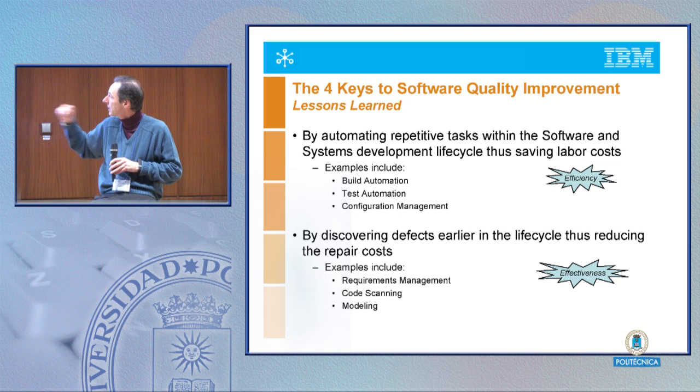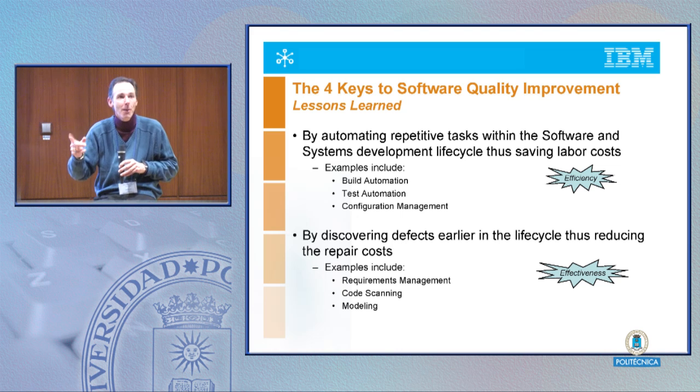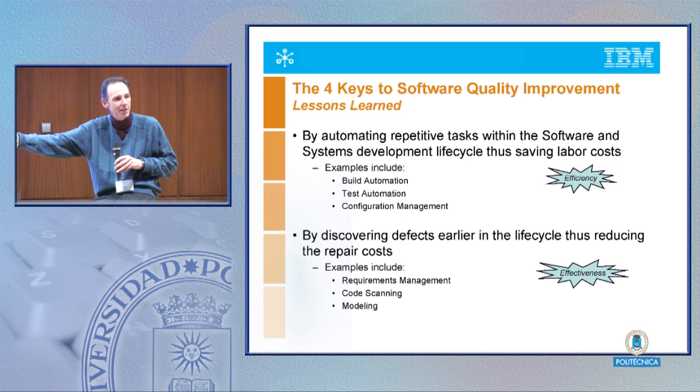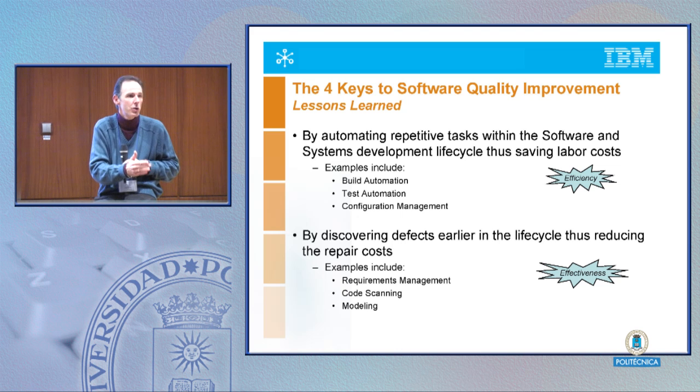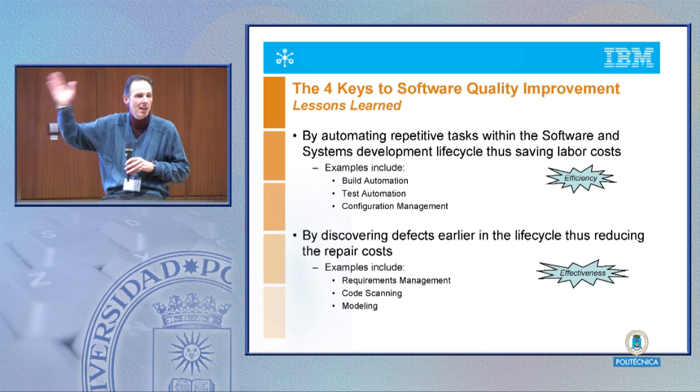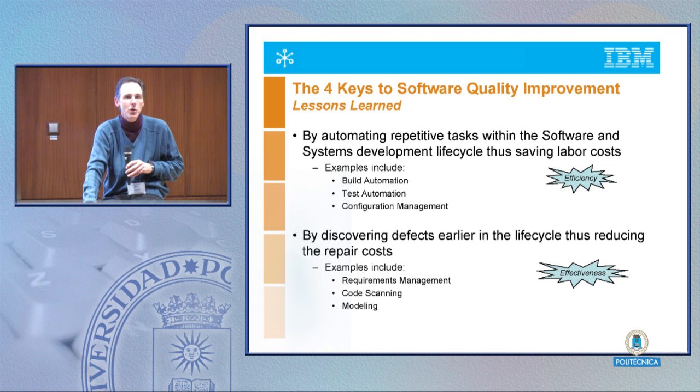The second thing is, of course, the defects come from somewhere. And usually, as we all know, they come from early in the life cycle. Misunderstandings about requirements, problems with design that show up late on. And we know to fix them late on is quite costly. Fixing them earlier is much, much cheaper. So understanding the earlier part of the life cycle also has a huge impact.